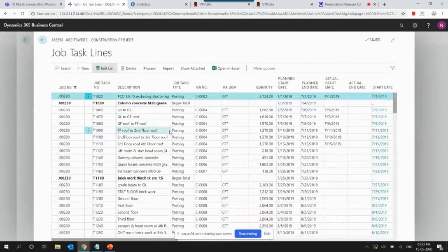You can also see provisions for defining the schedule of the projects as planned start date and planned end date. And you will also be able to update the actual start date and the actual end date through Microsoft Project and Primavera. These are the two scheduling software with which we have done a two-way integration, which means the BOQ you see in the core ERP application will get pushed back to Microsoft Project or Primavera.